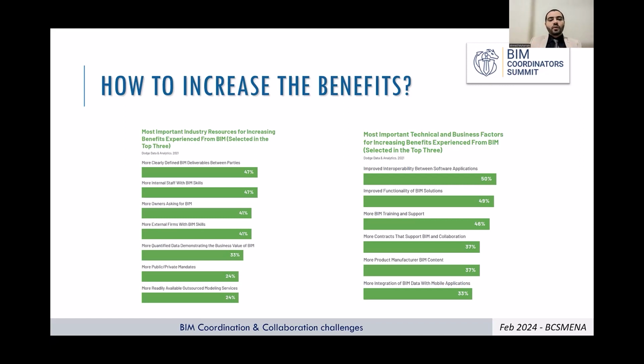equipment submittal. When we are asking the site team for the IR, inspection requests, did you issue your inspection request? Did you get it signed by the consultant? Are you going to cast on this day? We are going to attach this information to our models. So he needs to know why I'm asking, why it's useful for him and for me, why it's useful for the project to have a collaborative approach between each other.